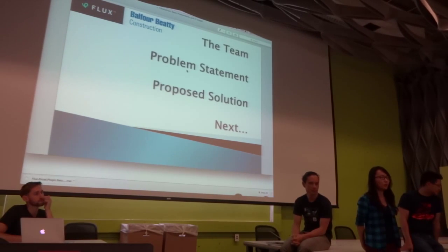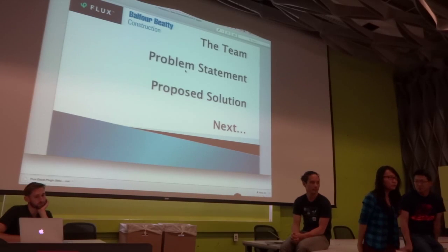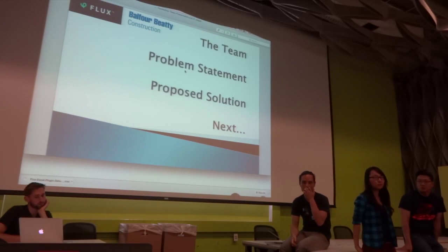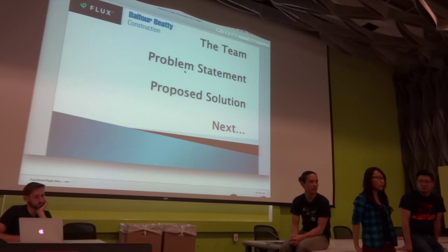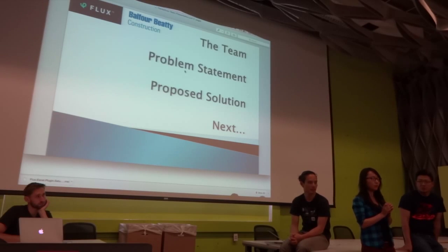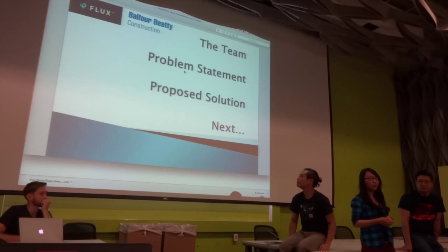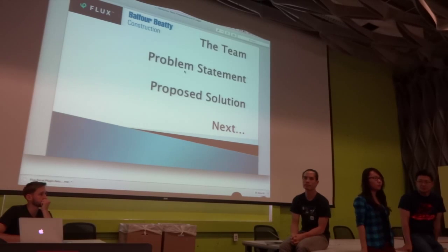The reason we're trying to do that is because, as a general contractor, a lot of times we are asked to fill out the table that the owner requests, with all those property information populated for the owner, including the equipment description, name, manufacturer, inspection date, and all those specs for this equipment for their use.